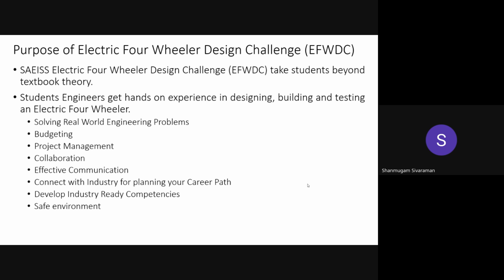And then comes collaboration. Now I told you 800 engineers work on a passenger car, in an automotive OEM as well as on supplier sides. But in this particular event, we will have 25 student engineers working on this particular vehicle. Now, first you need to understand what all the activities involved are. Then you need to split the work. When you split the work, you need to assign that work to one of the student engineers.